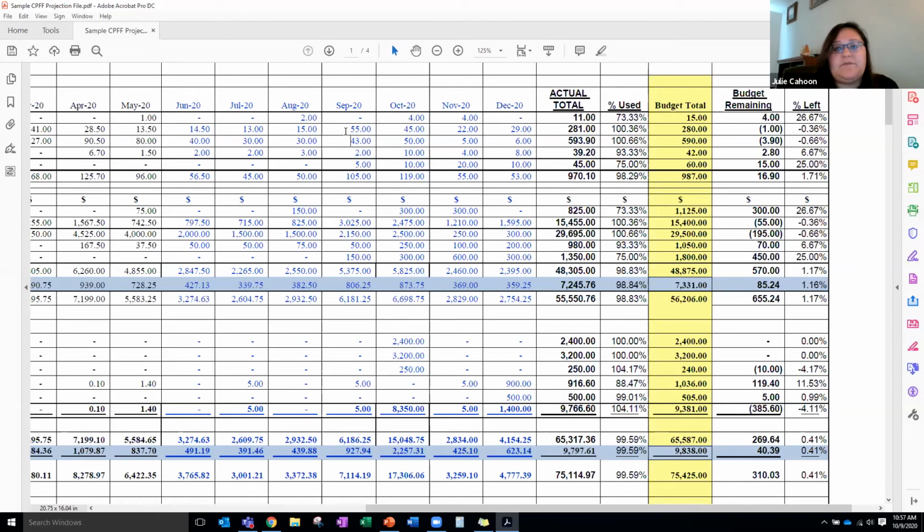And so these numbers will tell you this is 43 hours across task 1, task 2, and task 3. So this is showing you total across all tasks, the number of hours that are projected for this particular staff person. And so you'll see overall, this is how many hours you thought they would use on the project from the very start.